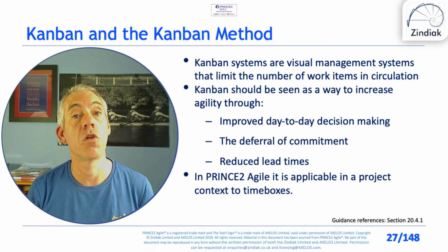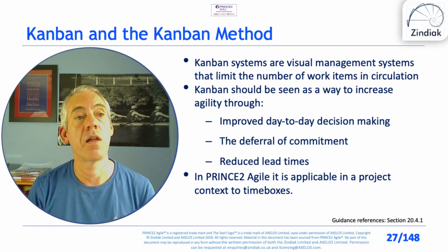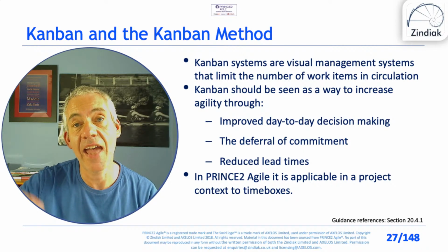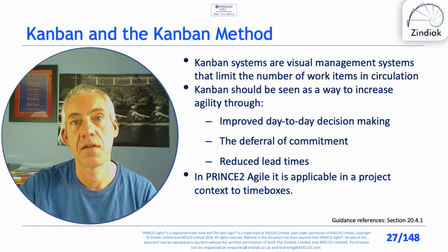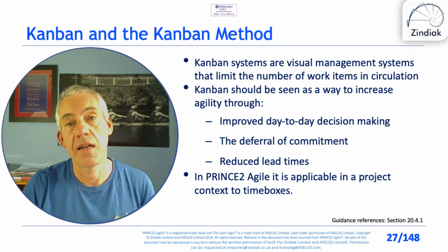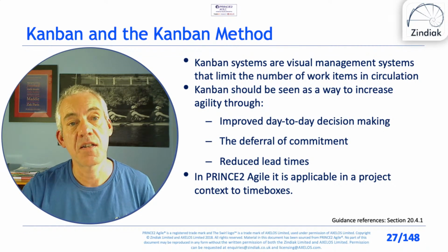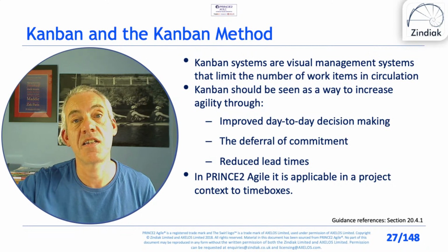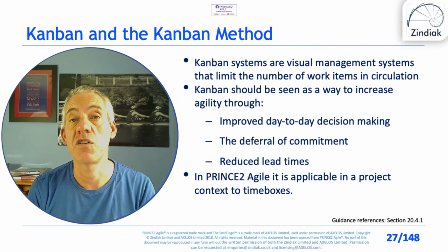So it's very useful for the development team who are making those day-to-day decisions, those lower-level decisions. It helps with deferral of commitment, so it's enabling or helping us make decisions at the last safe moment. So generally that's what we want to do. If we leave decisions until the last safe moment, it's giving us the maximum amount of time to gain information which will help us make those decisions. Notice I'm saying last safe moment. We don't want to leave the decision making so late that it becomes late, or worse, we don't make a decision. And